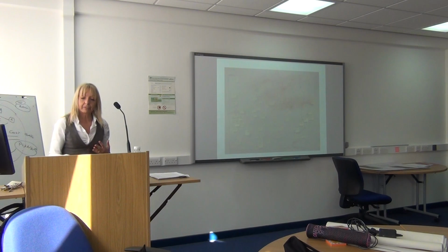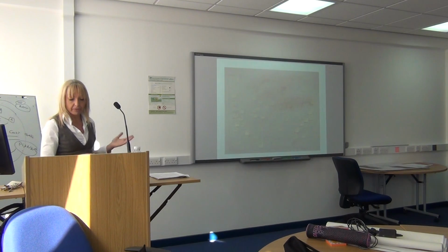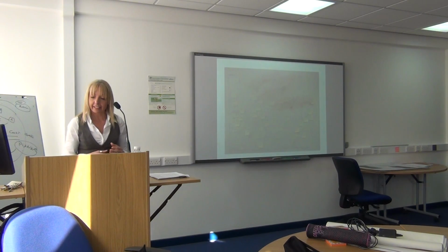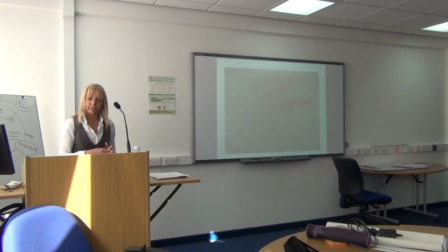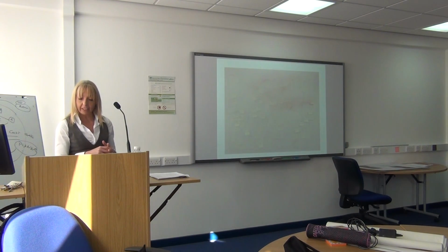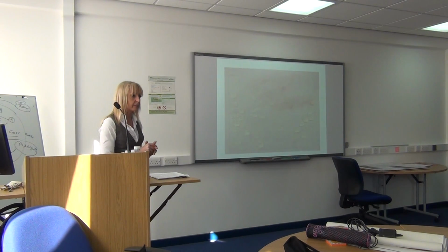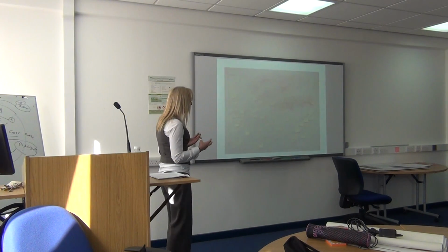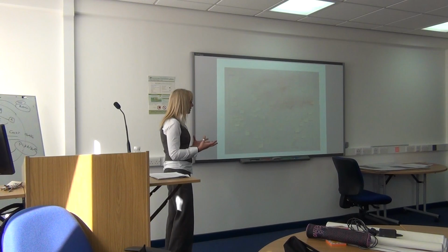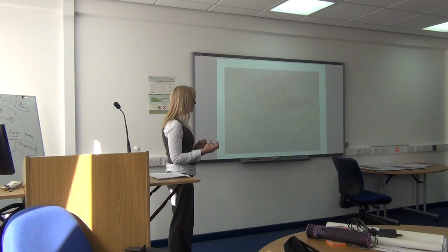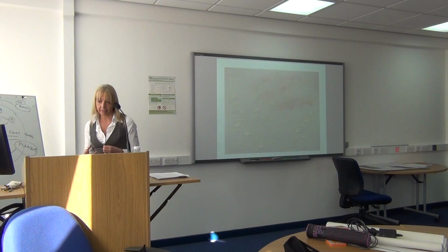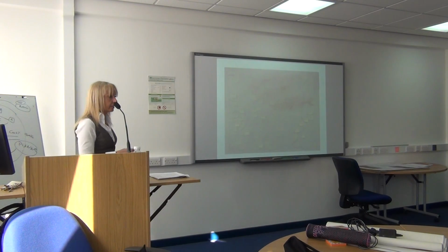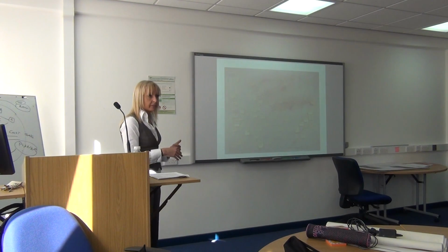So by capturing formal and informal stakeholder relationships graphically in the form of this map or a network analysis, it also allows analysis of the enhanced network. The analysis suggests stakeholders shown as being linked into many relationships would be likely to be seen as significant by other stakeholders. So by doing this, not only are you identifying the informal networks, but you're identifying how these could be coerced or converted and consequently managed. And the importance of these people could then shift, and that's the reason for them being done on sticky notes.